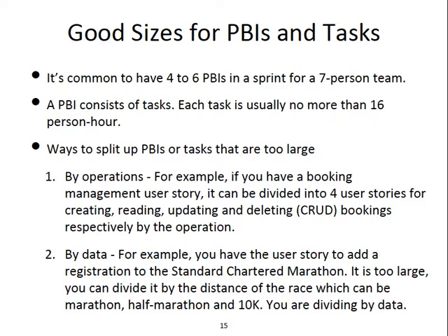If you think it's too large, what can you do? Well, maybe you can think of the creation of a booking record, retrieving a booking record, updating a booking record, and deleting a booking record, all as 4 separate user stories. So instead of one big user story looking after all these 4, you can divide it up by the operation, or by the CRUD: create, read, update, and delete. Then that can make them smaller.